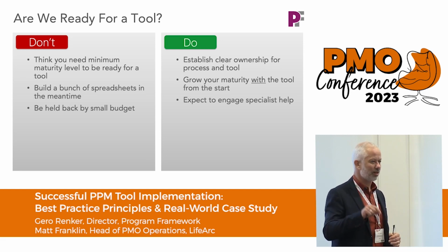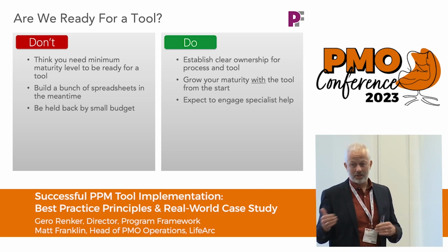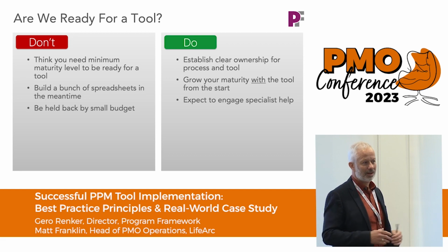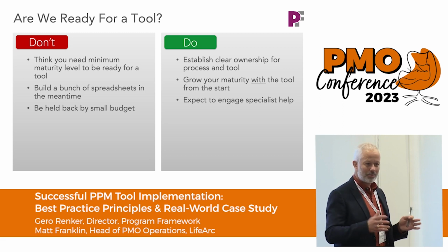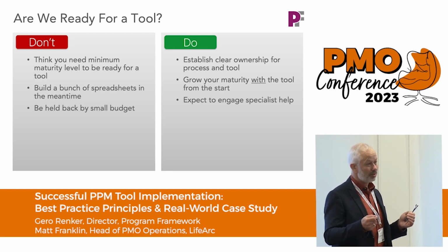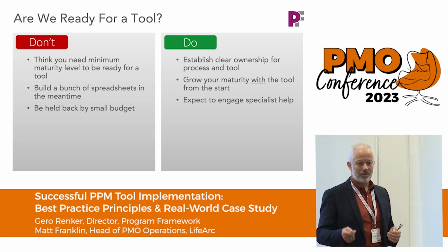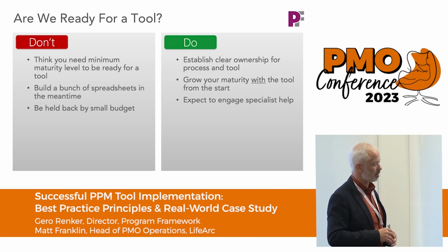And just to bring to life one example of why that was a problem for us, we are still developing in our maturity as a project organisation, although fundamentally what we do is research and development. We did have some fairly good governance, particularly around our scientific projects, but that governance involved quarterly meetings, and typically it took us 3 months to prepare for every quarterly meeting, because we were gathering all that data across potentially 30 to 40 scientific projects. So it was a full-time job, probably for more than one person in reality. That gives a sense of where we were at and why we needed to bring all of that good data together.